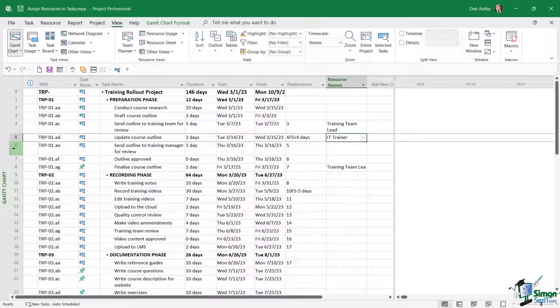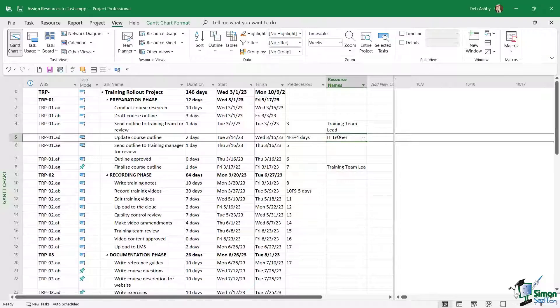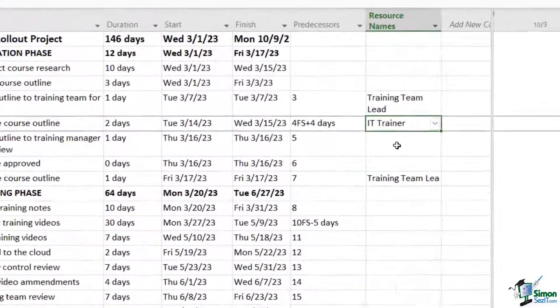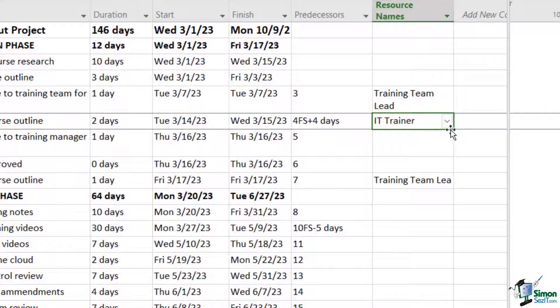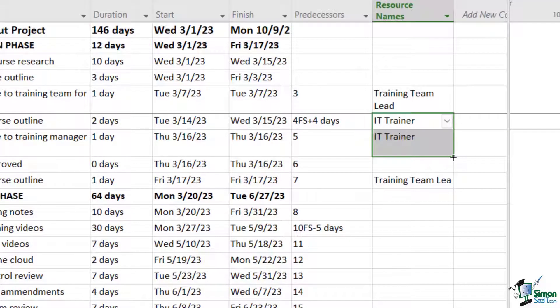Now the next task, task number six, is again going to be completed by the IT trainer. So what I can actually do is copy the resource name to the cell below. If we hover our mouse over the corner of the cell above until we get that little crosshair and then simply drag down, it's going to copy that resource assignment. So that is method number two for assigning resources quickly.